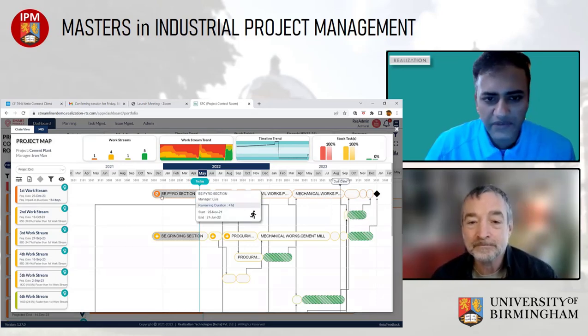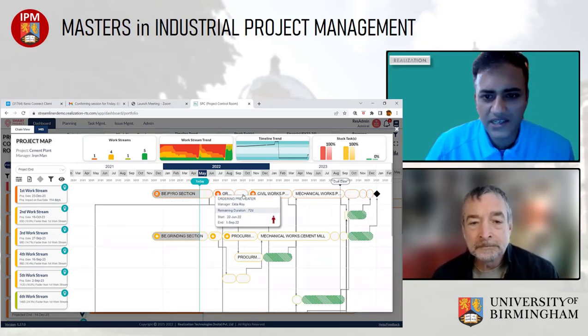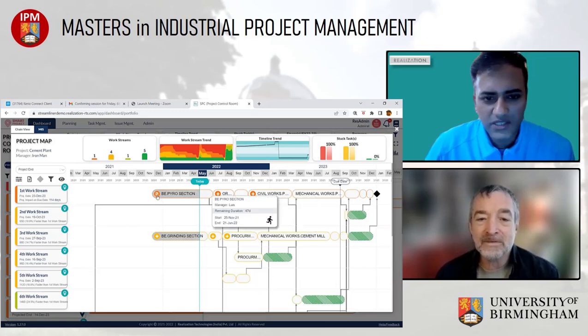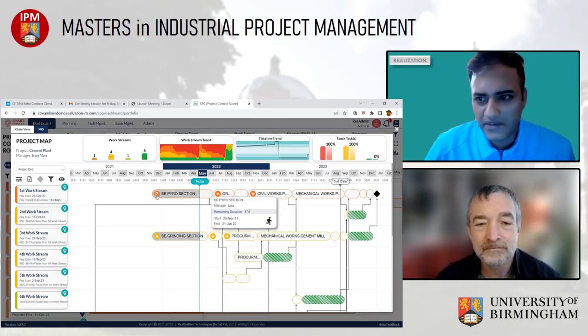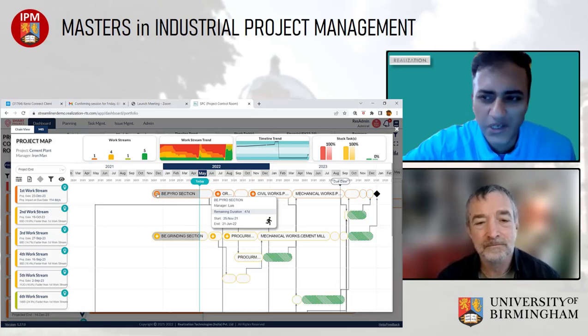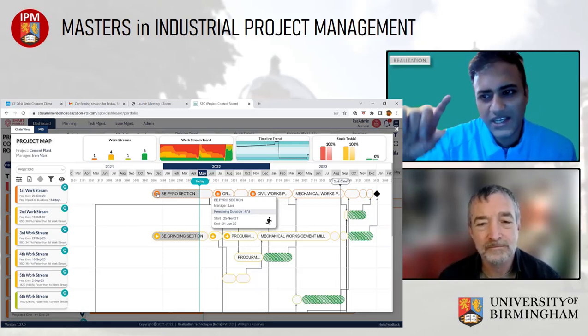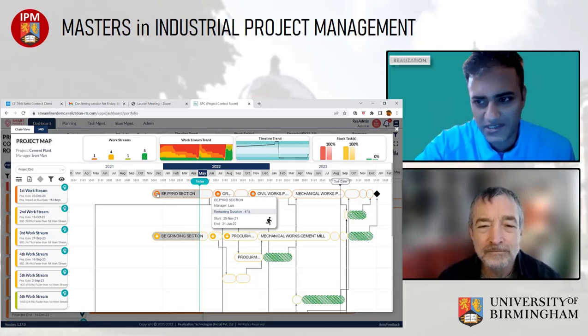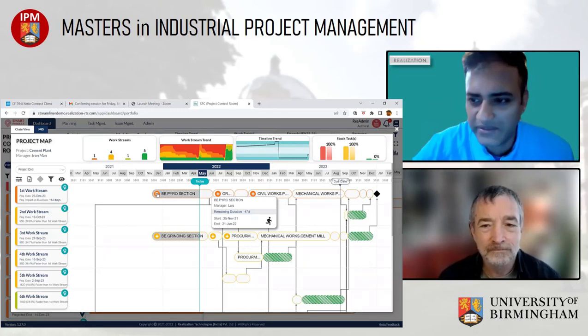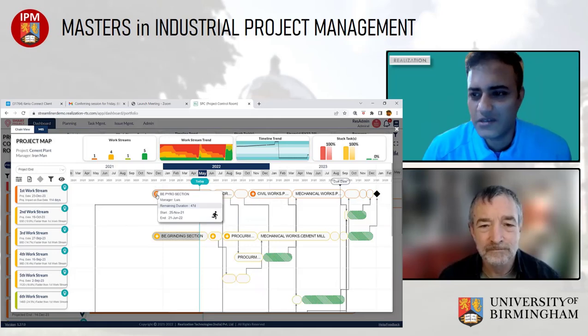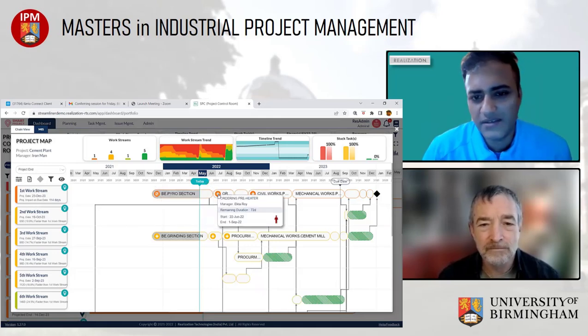Right. So if you look at this picture, there are some icons alongside the boxes. There is an icon which looks like a plus icon, and there is a slightly different icon. So this icon tells you that there are no tasks below. So we have gone directly to the super dots, which is basically the tracking level. Or as you were saying, in my system, there are 10,000 drawings, of which this is pointing out 50 of those. I don't care about what dependencies there are between those drawings, because you will manage it anyway. All we are ensuring is you have enough capacity for those 50 drawings. So I can go down there, or I can go down to the schedule level, which I will show.